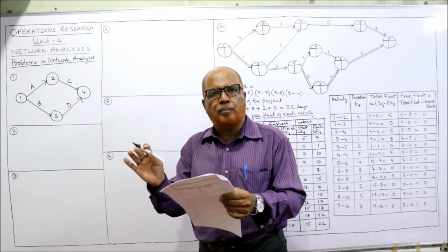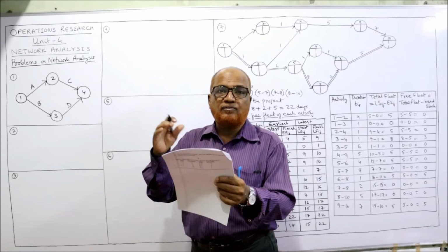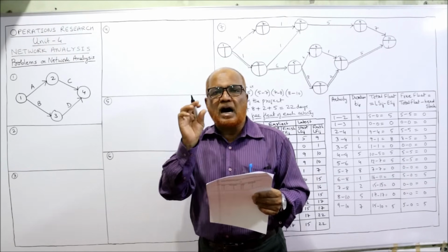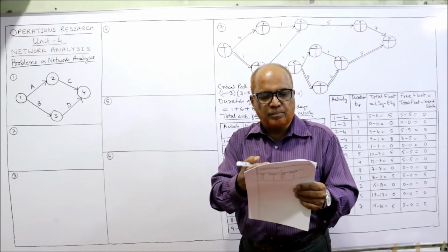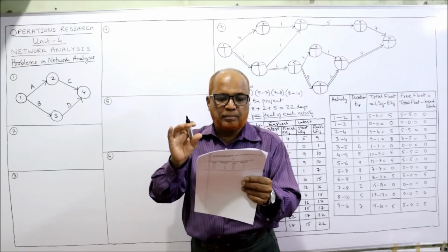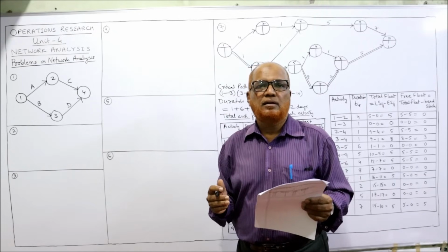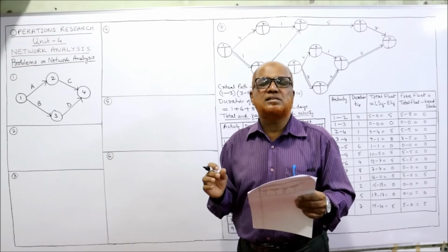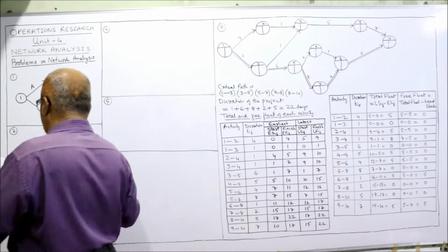For activity B, no predecessor, just like the previous case. Then C follows after A and D follows after A. That means after activity A, 2 activities are following, that is C and D. And E activity follows after C and B. That means B and C should combine. So after combining B and C, activity E is succeeding. That's it. Now we'll start the second problem.